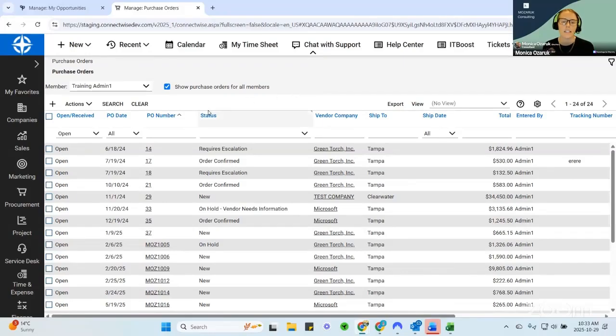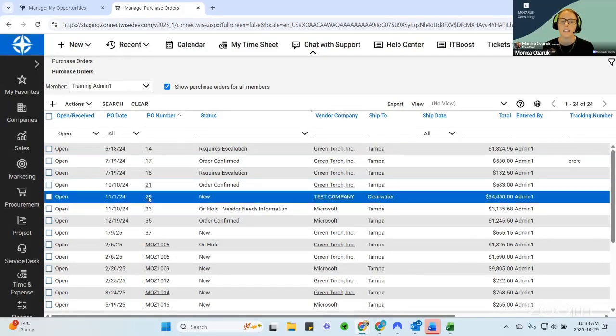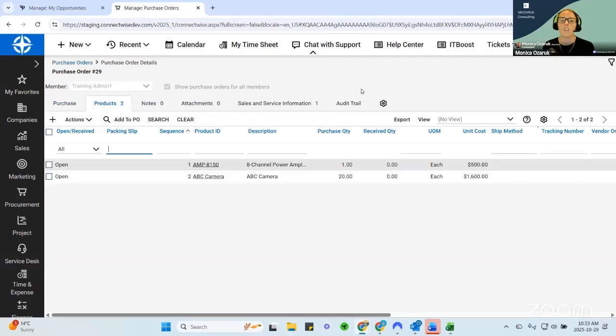Part of the reason for this is that when you send in a purchase order, you might be sending it in with the wrong cost. If you're using an old price sheet, if you haven't purchased this product in a while, whatever the case may be, there's a chance that you send your purchase order in, your costs are wrong, your vendor sends a confirmation form back, and you find out that the costs have changed. The absolute best time to solve this is before you receive the product. So that's why you can't just send a purchase order and forget about it.